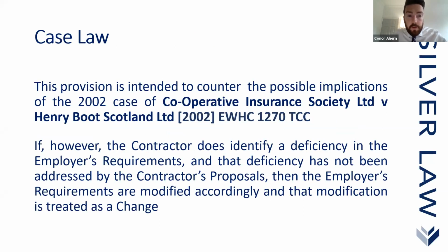so some case law in this area is this provision is intended to counter the possible implications of the 2002 case of Cooperative Insurance Society Limited versus Henry Boot Construction Limited. If, however, the contractor does identify a deficiency in the ERs and that deficiency has not been addressed by the contractor's proposals, then the employer's requirements are modified accordingly, and that modification is treated as a change.